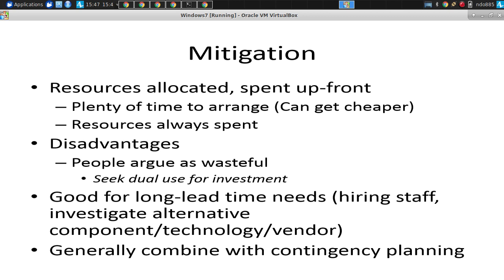They want to clear house. This is not uncommon in companies. New person comes in and says, I want to have new staff. I want to start with a fresh leaf, not have backbiting, not have the old team conspiring against me. So they got rid of everyone, got rid of the contracts, canceled our contract. We had this clause in there for $80,000. They paid. It kept the staff alive for the better part of a year until new arrangements could be made. So this is an example of a contingency plan.